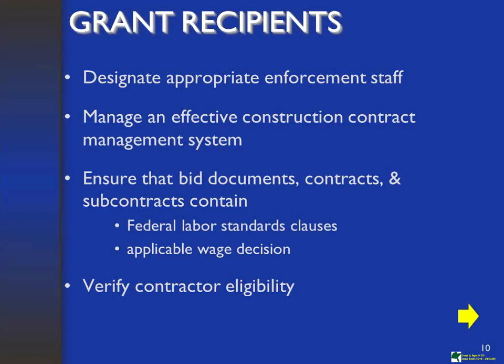And then also verifying the contractor's eligibility. That's referring to the prime contract, that there be some sort of verification through the EPLS listing that you all, or whoever the grantee is, have checked on that contractor to ensure that they're not debarred from participating.